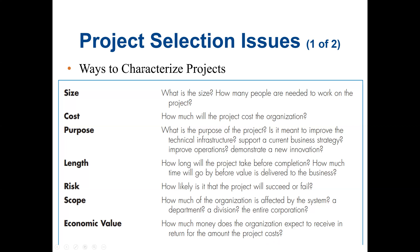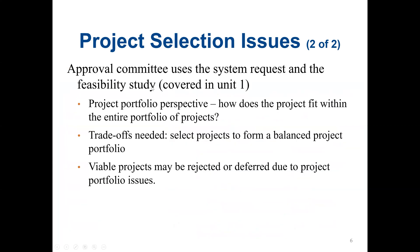Project selection issues also address the feasibility studies, which were covered in previous lectures. We need to do a feasibility analysis on technical issues, organizational issues, and economical issues. Those three feasibility studies cover almost all the categories here. The approval committee uses the system request and the feasibility study in making its decisions.